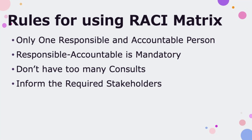Rule 2: Only one or two responsible parties. Too many parties assigned to the same task could lead to duplication of work and wastage of efforts and costs.